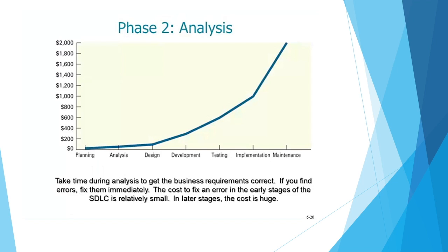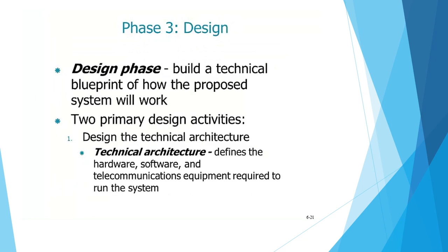And this little graphic here shows you, as you move forward in the SDLC, the costs associated with each element increase. If you don't fix them, errors at any early step are going to impact the system later for sure. If you don't plan appropriately, your maintenance costs are going to be very, very high, because when you start getting into maintenance, you're actually not maintaining, you're actually continuing to develop.